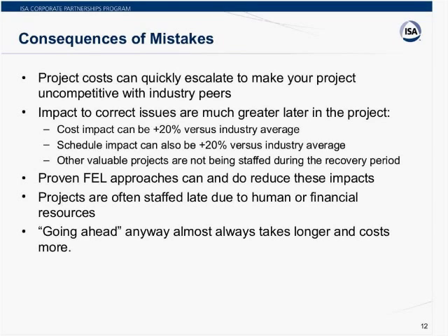Projects often get staffed late when you realize late that you have other work to do, and it could be a combination of you just don't have the right people on the bench available with the skills to do this additional work, or you can't afford the resources to do the work because it wasn't in the original authorized budget. And as Nick alluded to earlier in the presentation, many times folks will say, well, let's just go ahead anyway. Let's just get on with it. This is a fast-track project. We really have to get done on time. And one thing's certain, going ahead anyway almost always takes longer and costs more.